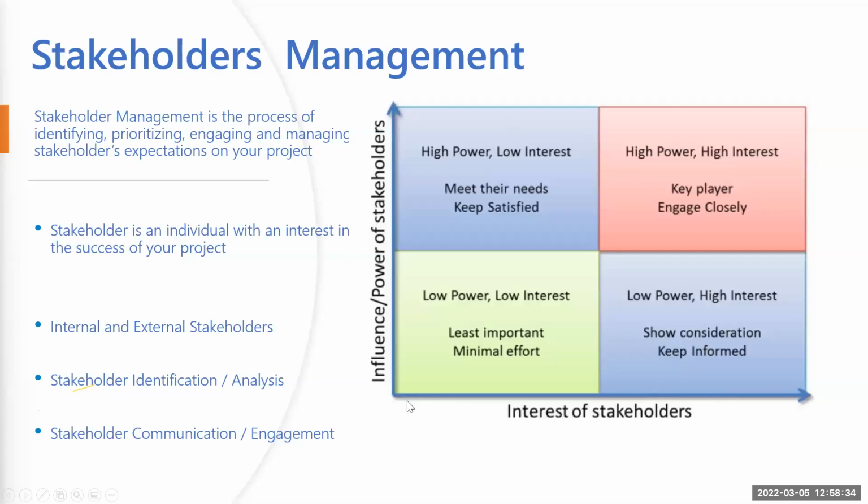So based on the information you have received and engagement you have had with them, you can know who is a stakeholder that has got the high power, but they are not really fully interested in how the day-to-day of the project is. So you know you need to meet their needs and keep them satisfied. Like those people, you don't need to irritate them with regular communications and all of that, but just know their mode of communication and know what they would need.